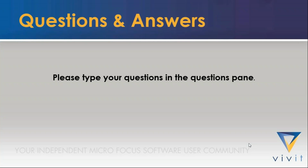So Derek, I'll take that question or comment. The migration from Service Manager to SMAX, specifically a heavily customized Service Manager, takes a bit longer, because you have to redesign processes, as Bihani has mentioned previously, and you have to relook at your strategy, relook at your business rules, and understand what the idea behind the customization was and whether you still require that. A migration from SOAR to Service Manager or to SMAX is a different ballgame. There are different rules applicable to that. And your time frame for migration from Service Anywhere to SMAX, as far as I believe from product management, is quite a bit quicker, as it's not as heavily customizable as Service Manager was.